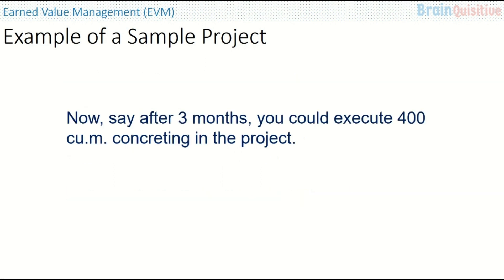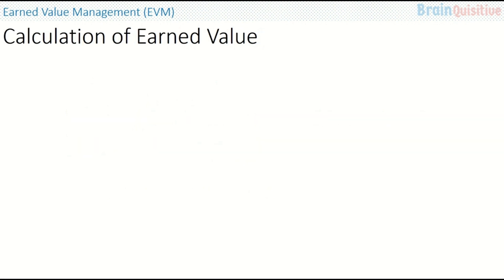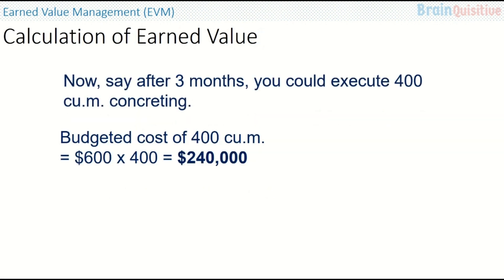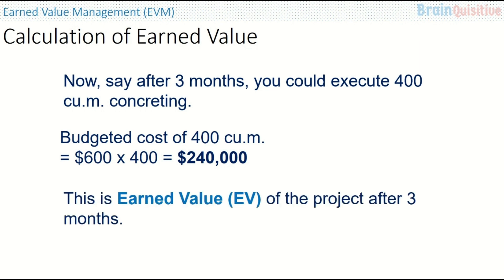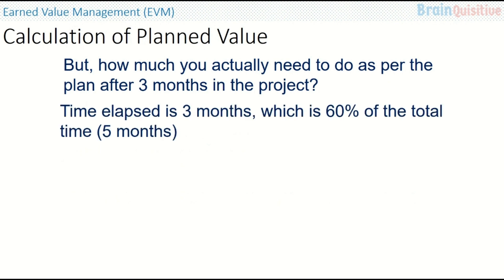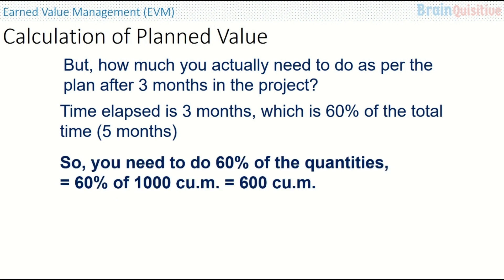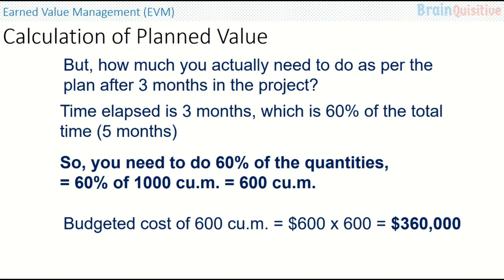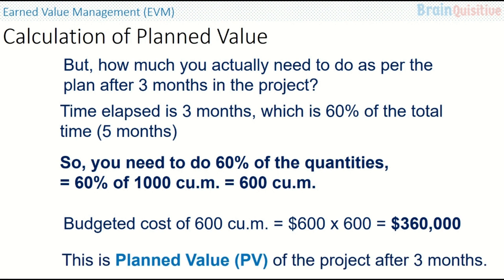After 3 months, you could execute only 400 cubic meters of concreting. So the budgeted cost of 400 cubic meters is 600 multiplied by 400, which is 240,000 dollars. This is the earned value of the project after 3 months — the quantity actually executed multiplied by the budgeted cost. As per the plan after 3 months, time elapsed is 3 months which is 60% of the total 5 months. So you need to have done 60% of quantities — 600 cubic meters — with a budgeted cost of 600 dollars multiplied by 600, that is 360,000 dollars. This is the planned value after 3 months.